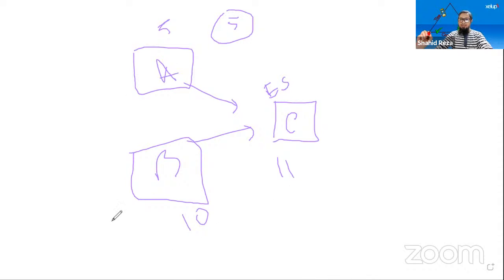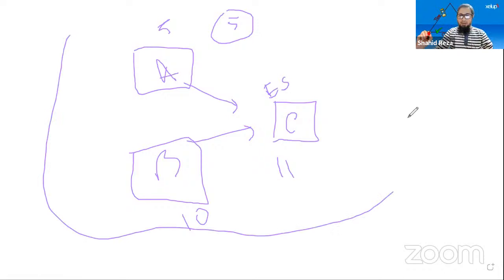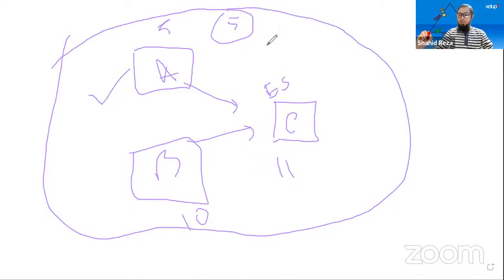So that is actually a snippet of a network diagram. And from this snippet, we can say for this relationship, A has the free float of 5 days, but B is not having any free float. Free float for B is 0. But for A, it is 5 days. So if I delay any task and it has no impact on the early start of its successor, then that duration is known as free float.